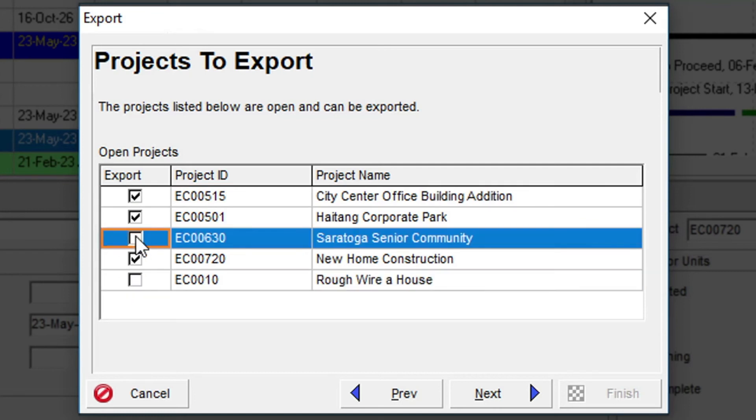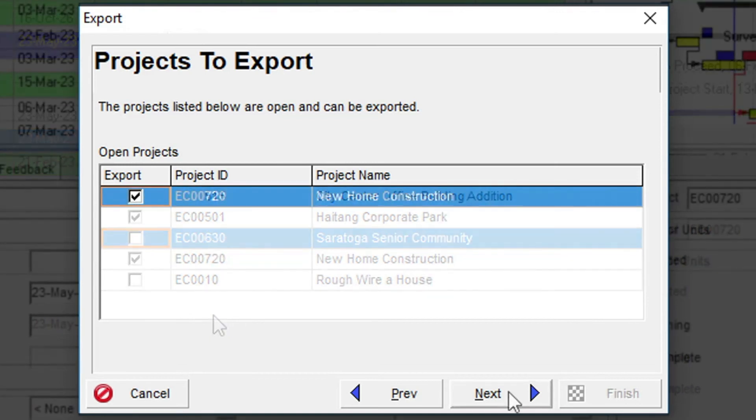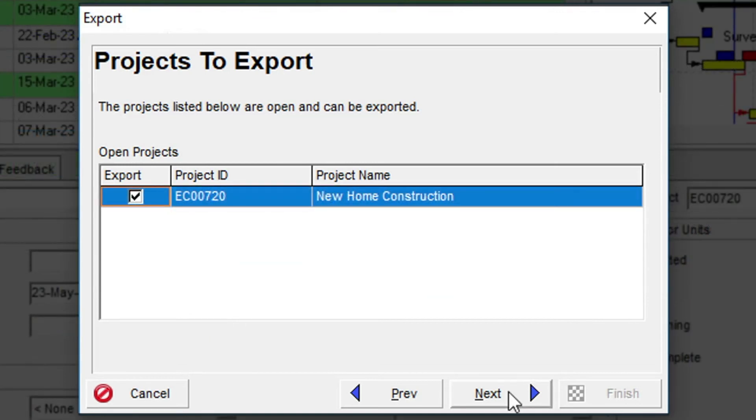and if we did choose multiple projects, they would all be exported in a single XER file. In this example, we will go with just the new home construction project and export this to the XER file.